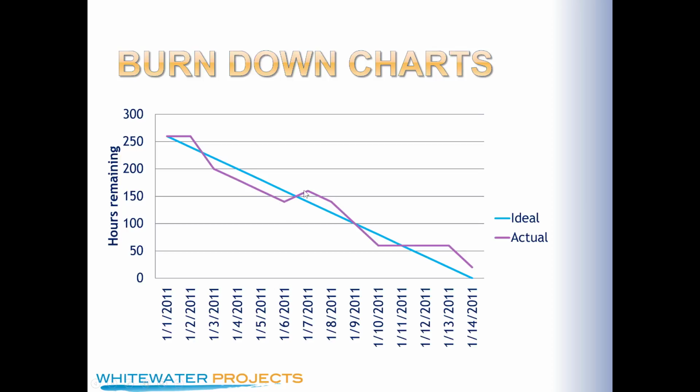And then here it looks like during day 6, something happened. They found some defect, or they found, we thought it was going to be easy to figure out this particular aspect, but it's actually more complicated than we thought. And so they upped their estimates. So they worked on a card. Say it was a card that had 7 hours. It was a 7-hour estimate card.